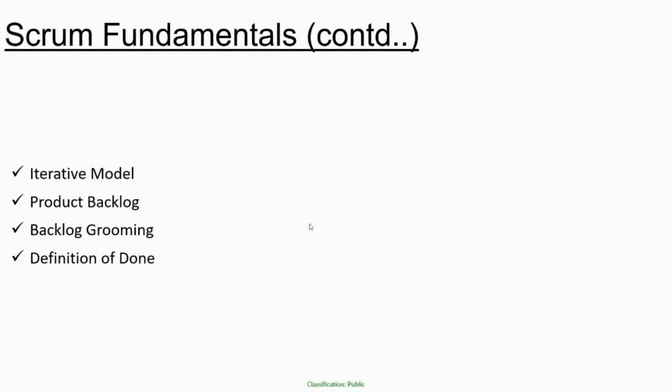And after that, whenever any user story is mentioned by the technical team that yes, we have completed thoroughly developing and testing, then you will use this definition of done and you'll ask these questions: is it thoroughly tested, is it validated, is it like this, like that, and all. So you have maybe 3 or 5 or 10 conditions in that checklist. You will check if your user story is meeting all these conditions. Only when it has met all of these conditions, then you refer to that particular user story as meeting the definition of done. Okay, so that is it.